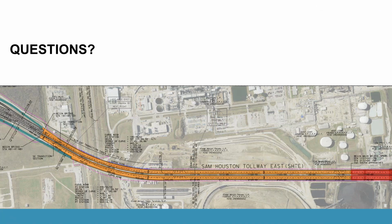You said that the drill shafts were chosen over driven piles, even though the drill shafts are 70 to 100 plus feet in depth. Yeah. Well, when you get into Pipeline Alley, you realize that those pipes are over 40 years old. We just didn't want to be blamed for the dynamic or the vibration effects that driving piling might have caused there. So that portion of the structure absolutely had to be drill shafts to avoid damages.